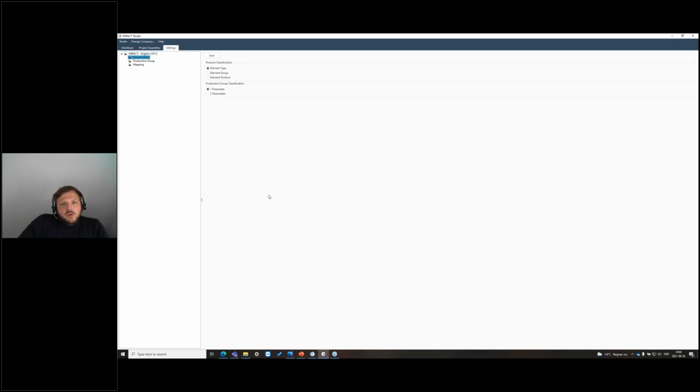But before we start, we need to decide how to divide the project. So basically, we're gonna work or do the workload for the different factories. Maybe we have one, maybe we have more than one. But in the project, you probably will have different element types. So how to divide those, because maybe you have one hall in your factory where you can do sandwich walls, and one hall where you do slabs. Then you need to divide those two, and etc.